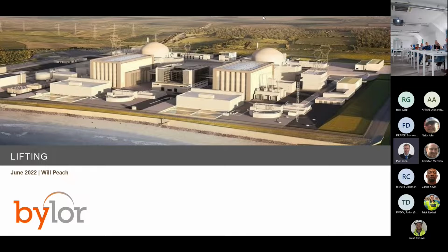Yes. So during the initial phase, during the design collaboration, the pour models are a tool to help us communicate our construction sequence. As we get closer to the construction, sometimes there'll be give and take with the planning team, so what used to be pour 1 is now going to be poured second, and pour 2 is now going to be poured first. But generally you can see that intention. And I mean that's the plan.